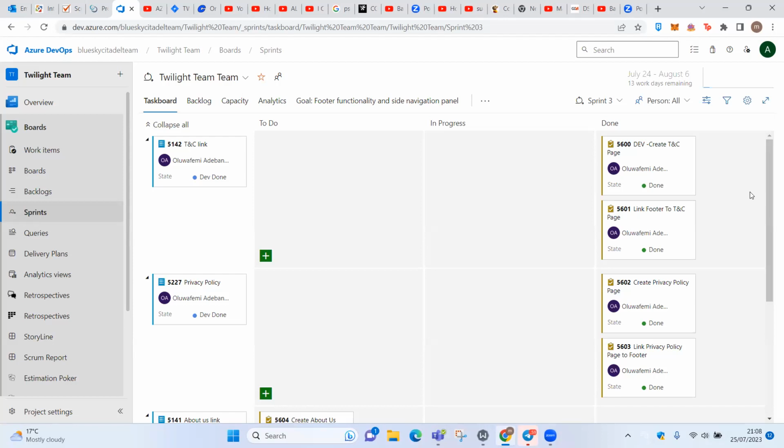Initially I did check with Mohammed about why, once the developer has done the work, we don't have the testers' or QAs' tasks on the board. He explained that more clarity was needed between the developer and the BA. Now that has been sorted and discussed at the DSU, the QAs can create their own tasks. Just make sure they estimate it in hours, because that would help them going forward.